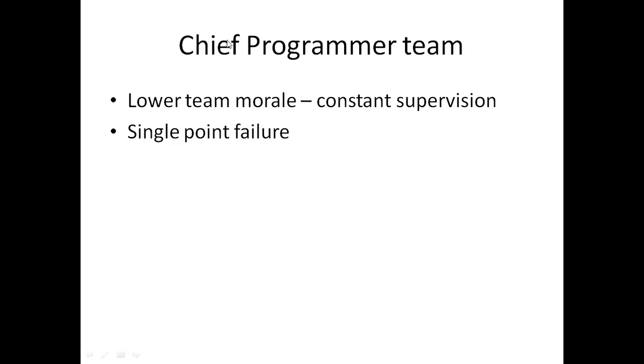And the second problem is that it is subject to single point failure. Success or failure depends on the chief programmer. The whole responsibility and authority for the project is assigned to the chief programmer. So there is a chance of single point failure.